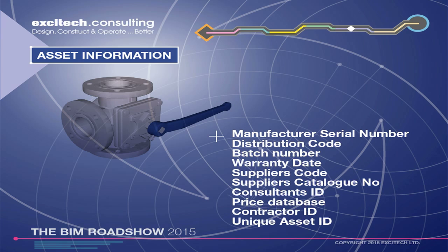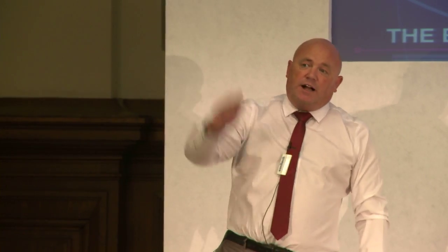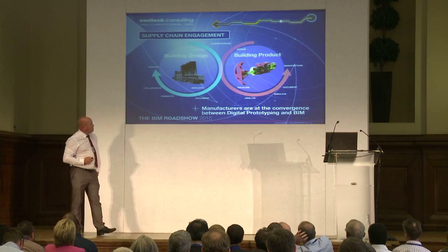This is going to be my problem. This is where I need to start engaging the manufacturers and people like that who are building these valves and getting the correct data out of them. I don't want their data sheet that's got every single valve they manufacture and a highlighter pen through the one they've just sent me. I need specific data for the element that's installed on site for the client to manage. Okay? And that's really important. So I'm going to show you processes on how I'm going to capture this data.